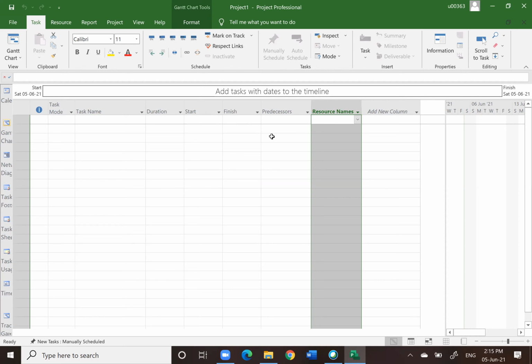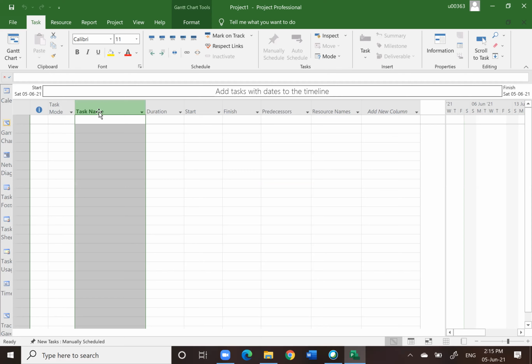And bear in mind, when you input into the task name, the way you input is basically like inputting any data into Excel. But if we are talking about Microsoft Project, remember, we need to organize the tasks according to WBS. Then only people can relate to it. WBS basically means we divide the items according to the work element.